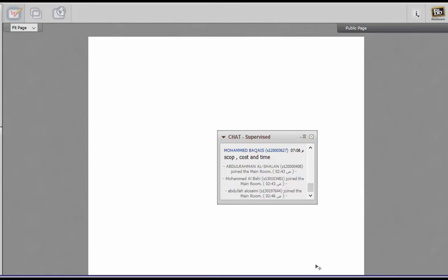A project charter is the first formal contract that is agreed between the end users, customers on one side and the development team on the other side. A project charter normally describes some very small but important details, such as when the project will start, when the project will end, who will be answerable for successful execution of the project, what will be the funding of the project, what are the major objectives of the project.